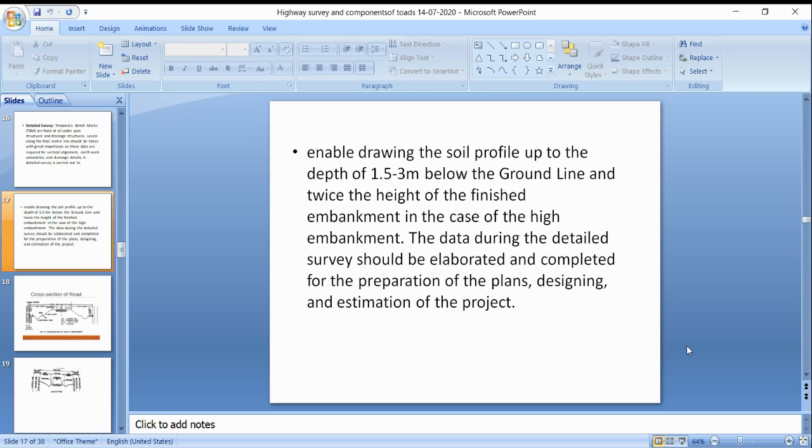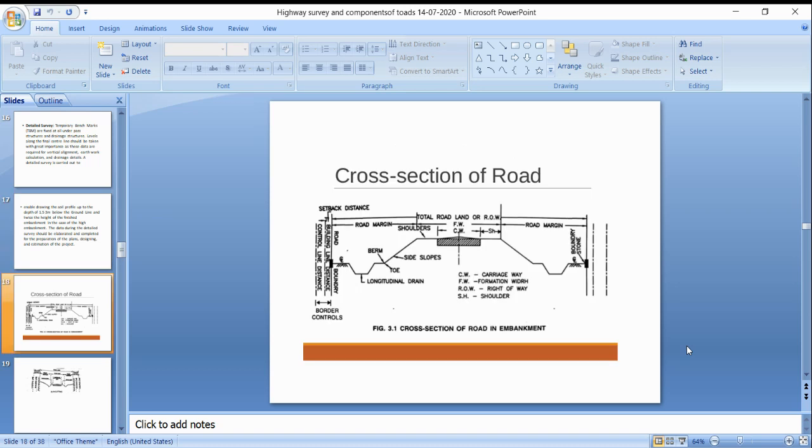In the general report, we are giving the road project feasibility, the cost of the project, and how much time is required to complete the project. All this detailed information is given in document form, submitted for the proposed routes. Next comes the cross sections for the route in embankment and the cross section for the route in cutting.